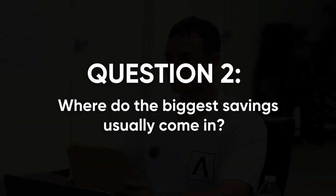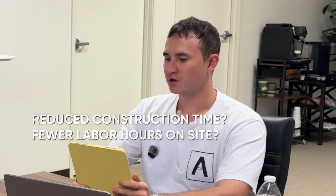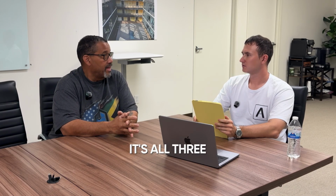If you are talking about the biggest savings, where do the biggest savings usually come in? Is it reduced construction time, fewer labor hours on site, or efficiency in the factory? I think it's all three, really, right? I mean, the efficiency in the factory leads to the speed of getting your building completed and ready to deliver to site. If you think about the fact that while you're putting your foundation in the ground, your building's being built. So once a foundation is ready, your building's ready to be landed on site. So that's a factory environment. That's a speed within which it can be completed.